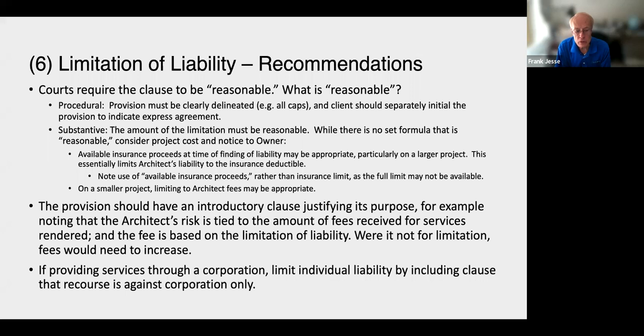My keen concern on one project was that I had a fine relationship with the client, but it was in a healthcare environment. My concern was third parties that might have some issue with the resultant healthcare project and be suing everybody and their mother. And so I limited my liability in writing with that healthcare organization for fees paid plus a sum above that. I can't recall the exact number, but it was something like $100,000. That's the way I was trying to cap it when I wasn't covered by insurance on that project.